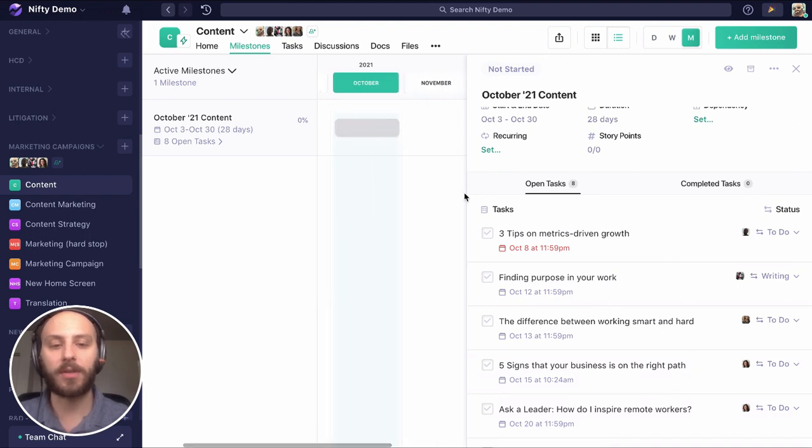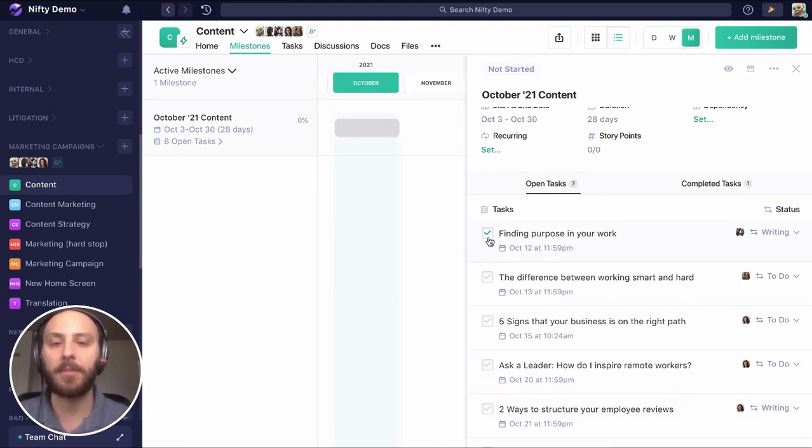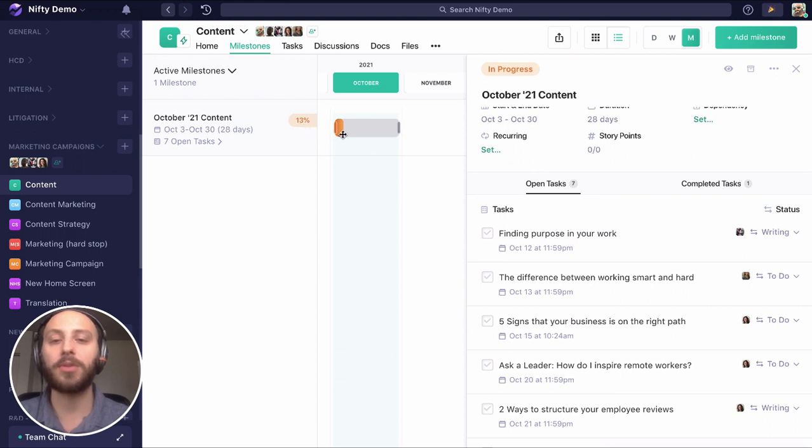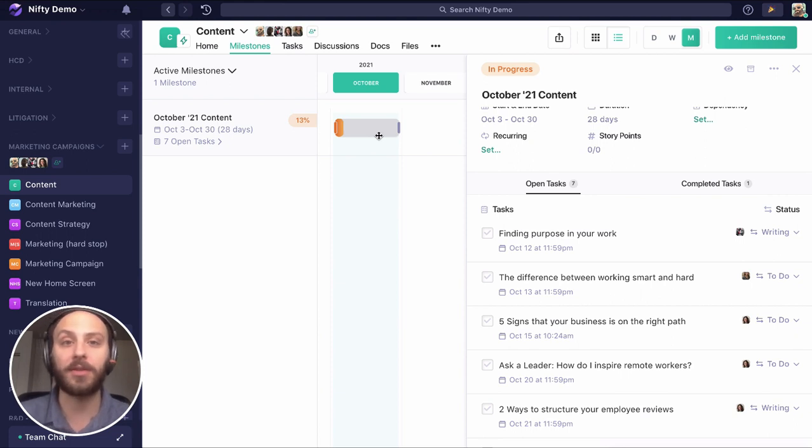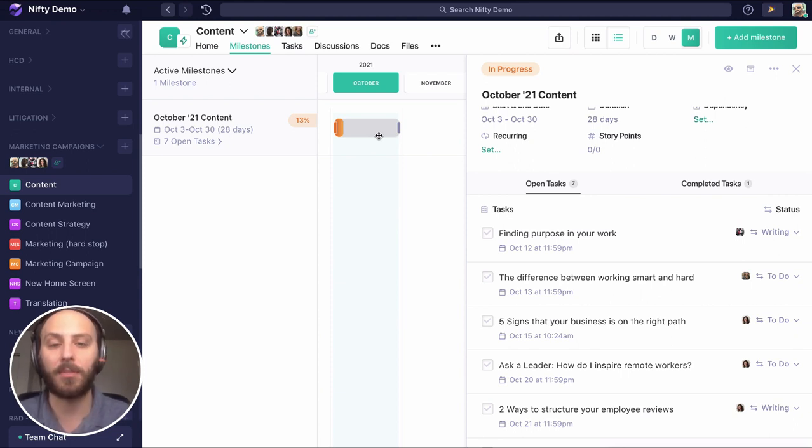We can see this one blog is overdue, but let's say we had published it on time. Now we can see we're 13% of the way done with publishing the blogs we want to have finished this month. This is a great way to gauge the progress of your milestone against how far you are into the month.